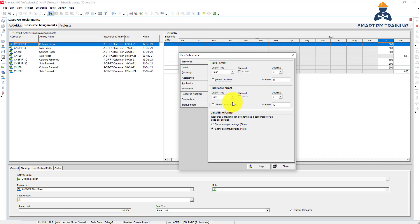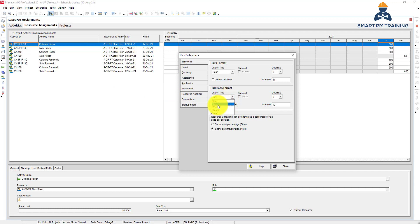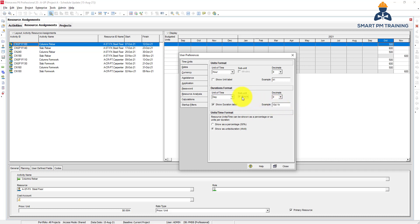For duration format, by default it's days. When you go back to the activities and you find the original duration, when you type 5 it's 5 working days, so it is by default. But you want to make it by default as hour or week? But day I think is fine and everyone is familiar with it. This way you want to also show the symbol or label, is it D for day or hours.